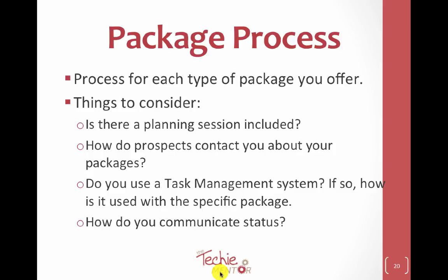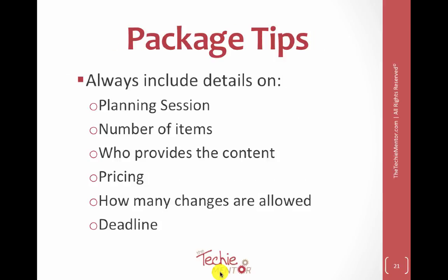Make sure that you have your task management system and make sure clients understand how you communicate status, right? Because they're paying you a lump sum. And whether they're paid up front for all of it or it's half at the beginning and half at the end, that's up to you. But if you do have a planning session or a discovery session, make sure that you include details: number of items, who provides content, pricing, and I cannot stress that enough, how many changes are allowed and the type of changes, right? Adding a logo or changing a logo is not the same as changing a template, okay?